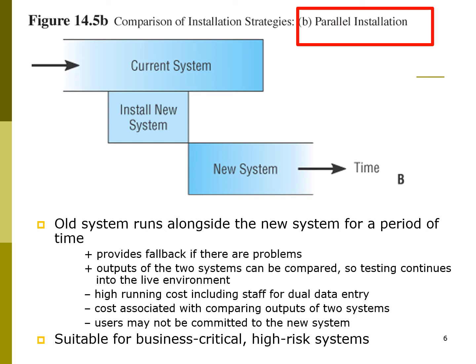Okay, this kind of strategy is suitable for business critical and high risk systems, meaning that for a critical system, you want it to be running at the same time. Okay, in case anything is not working well, you can straight away move to the current system.